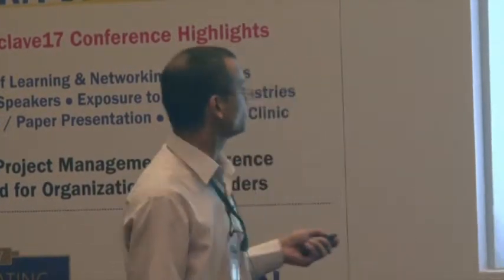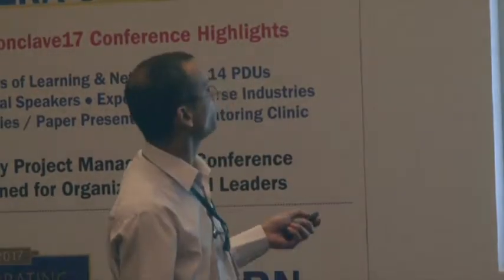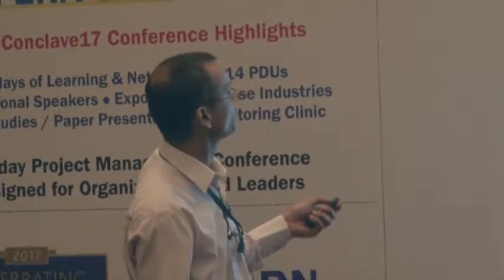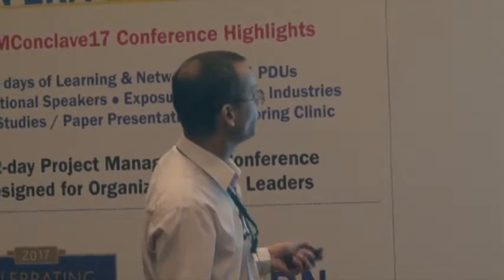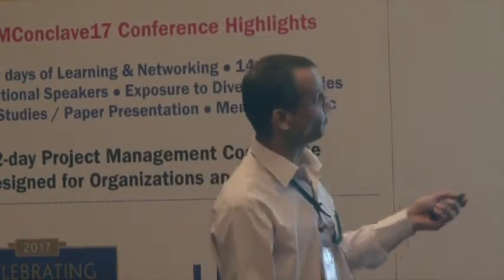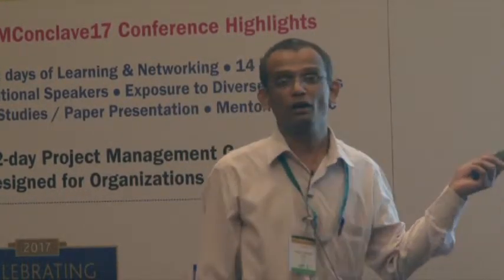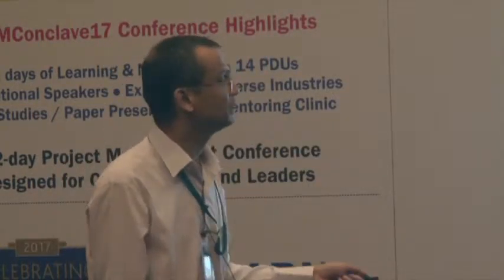I'll go ahead. And now I'll incorporate what my resource manager, or the people who are going to execute this task, have specified. Considering all the worst case scenario, the pessimistic scenario here, the optimistic scenario. With this, I'm going to model and find out the probability that the project will be finished in a particular number of weeks, either 47, 48, 49, or 50.